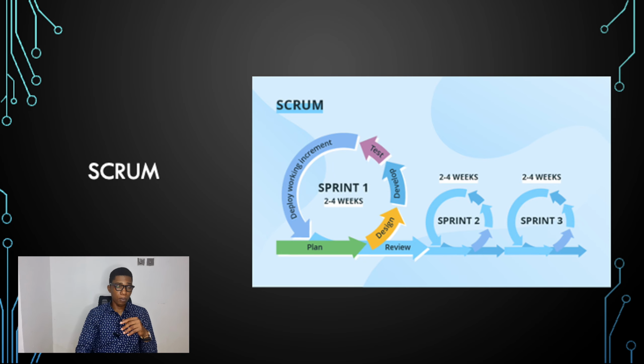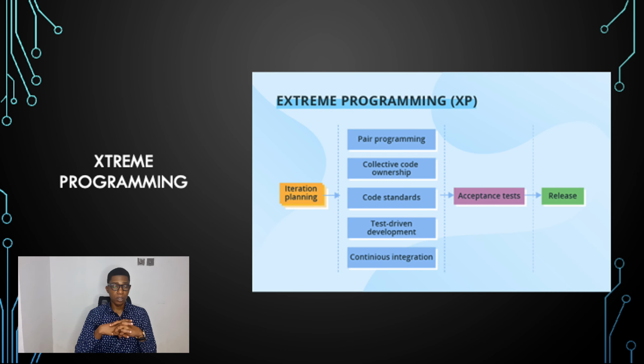So there's also an extreme programming model. The next model we'll look at is extreme programming. In the extreme programming model, an iteration typically lasts between 1 to 2 weeks. It allows changes to be introduced even after iterations launch, if the team hasn't started work on the relevant software piece yet. Such flexibility significantly complicates the delivery of quality software.